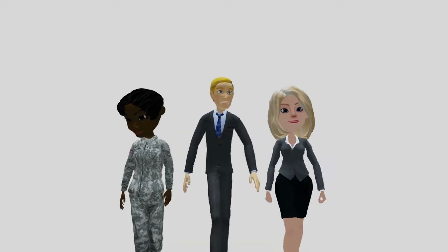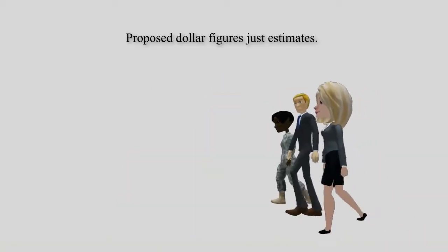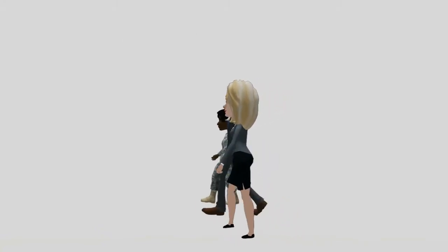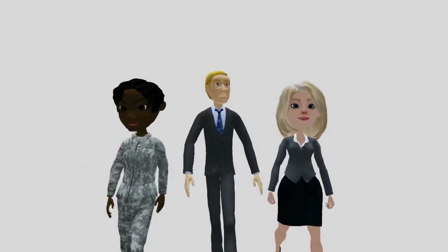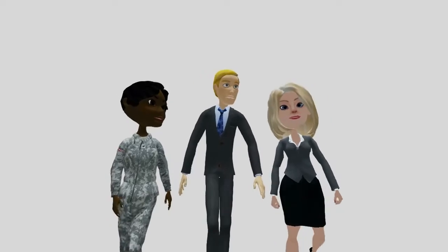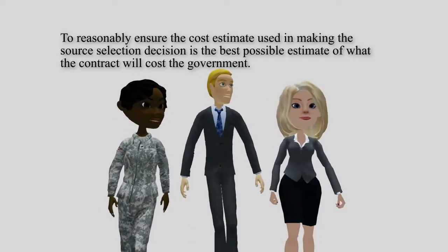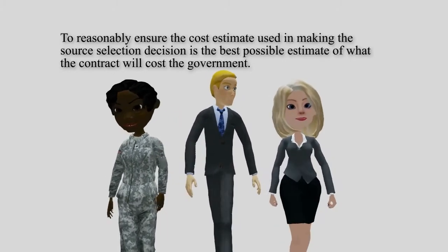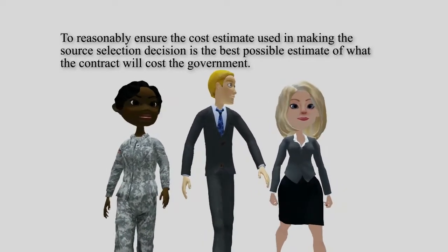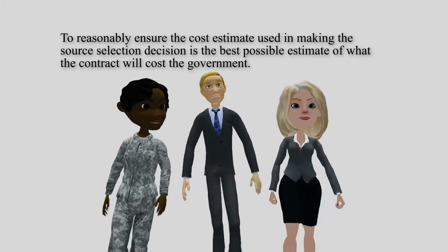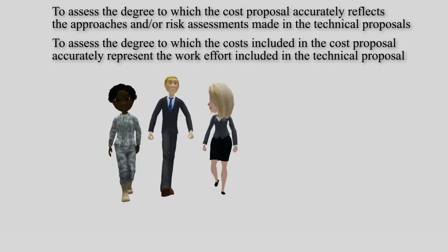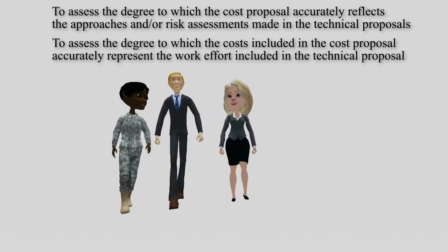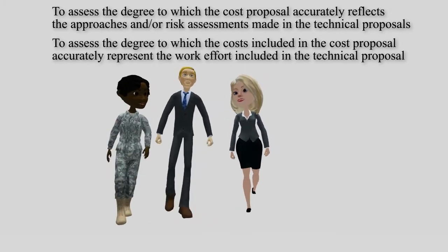Since the government's obligation to pay is not fixed to a specific amount, and since the dollar figures proposed and those included in the contract are just estimates, and since we are going to make a source selection decision based on trade-offs between these cost estimates and the evaluated non-cost merits of the proposals, we obviously want these cost estimates to be as accurate and reliable as possible before we make that decision. A cost realism evaluation also serves to verify the offeror's understanding of the requirements, assess the degree to which the cost proposal accurately reflects the approaches and risk assessments made in the technical proposals, and assess the extent to which the costs included in the cost proposal accurately represent the work effort included in the technical proposal.